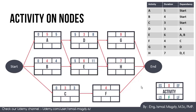Activity F has Early Start = 3 and duration = 4, so Early Finish = 7. Activity G has Early Start = 8 and duration = 9, so Early Finish = 17. Activity H depends on D (finishes at 8) and E (finishes at 11), so Early Start = 11, duration = 7, Early Finish = 18. Therefore, the total project duration is 18 days.